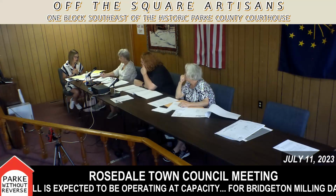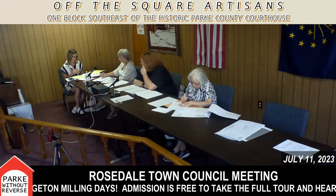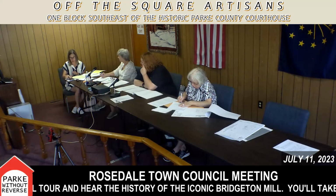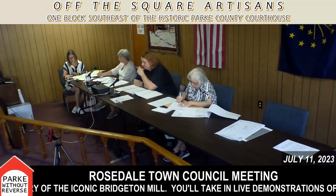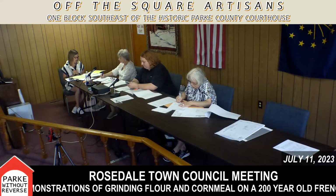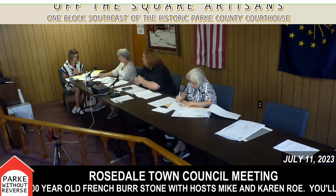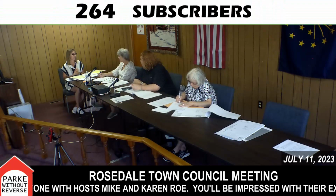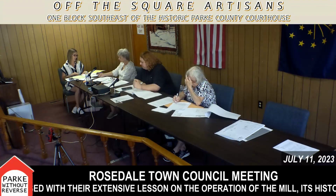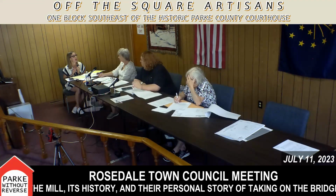So we're still not sure on the meter bases. Matt and I were going to pull a couple lids next time he comes down. Those are $65 a piece. So even if you budgeted $300 per meter, which is high, and you did 50, 300 times 50 is $15,000. And that's before we pay any of the other fees. So we have to do something. I'm not saying we have to make a decision tonight, but we do have to get a plan. These can also be half paid for out of wastewater, which I never thought about.